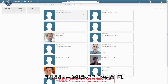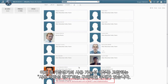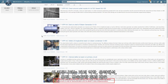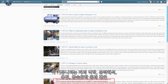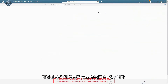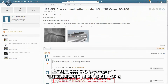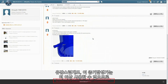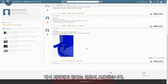In this case, the SG was damaged. There is a specific topic called fitness for service, which means whether we can use it or not. This community consists of various experts in areas such as fracture mechanics, stress analysis, welding, metallurgy, etc. We describe the detail of our project in a question, and the experts give their advice from various points of view. Unfortunately, the conclusion is that this SG cannot be used anymore and it needs to be refabricated.